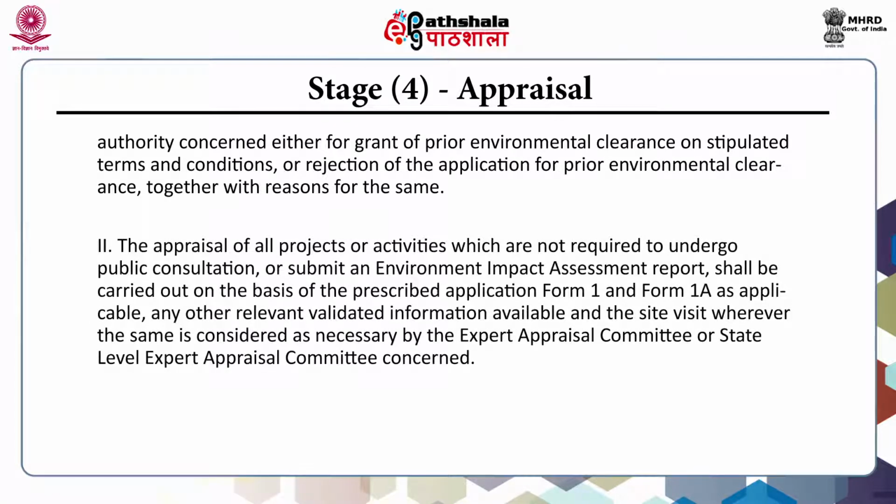Further, the appraisal of all projects or activities which are not required to undergo public consultation or submit an EIA report shall be carried out on the basis of the prescribed application Form 1 and Form 1A as applicable, any other relevant validated information available, and the site visit wherever the same is considered as necessary by the Expert Appraisal Committee or the State Level Expert Appraisal Committee concerned.